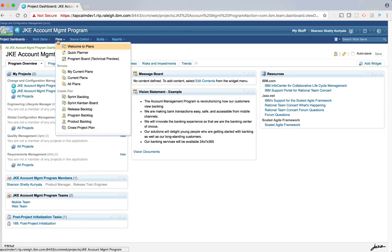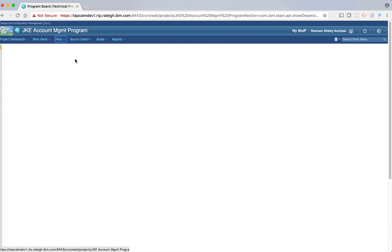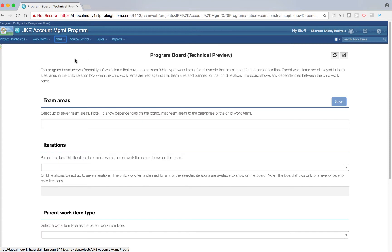To open the program board, click Plans and select Program Board Technical Preview. Note that if this is the first time you're configuring the board for this project, you're taken to the preference view. The program board shows parent type work items that have one or more child type work items, for all the parents that are planned for the parent iteration. Parent work items are displayed in the team area lanes in the child iteration box when the child work items are filed against that team area and planned for that child iteration. The board shows any dependencies between the child work items.